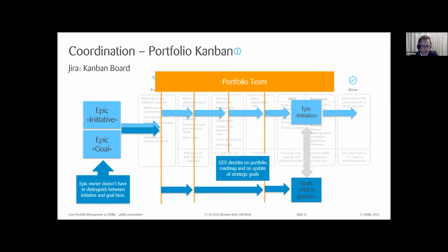You can see it depicted here. It's actually an implementation in Jira. We have this Kanban board, and there is a specialty that we have. I think this is really a nice one. We don't just accept ideas for new initiatives in this Kanban, so in the funnel, but we also encourage our colleagues to come up with goals or with epics, and we also take these into consideration and treat them on a monthly basis with the portfolio team. So over time, we push the things forward with this portfolio team.